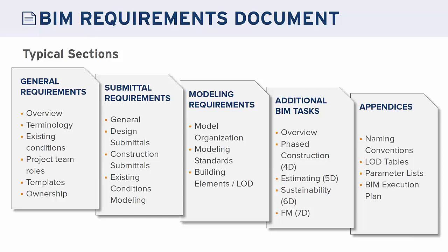The additional BIM tasks section defines what other BIM tasks you'd want on a per-project basis, since every project is unique. This could include 4D, 5D, 6D, or 7D work — construction sequencing, bill of materials takeoffs, LEED documentation, and so on. The appendices section is where you put the large tables that are too lengthy to include in the main body.